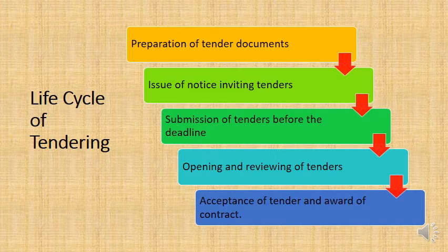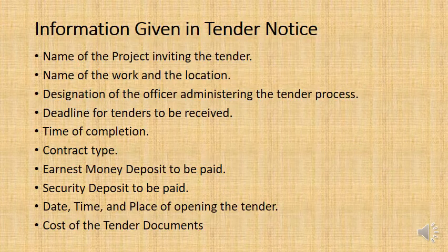Now, this could be for a lump sum contract, it could be for a cost plus type contract, it could be time and materials, it could be anything, but if you're going to the effort of tender documentation, usually it would have some element which will be lump sum. So the tender documentation is going to have a number of different things involved.